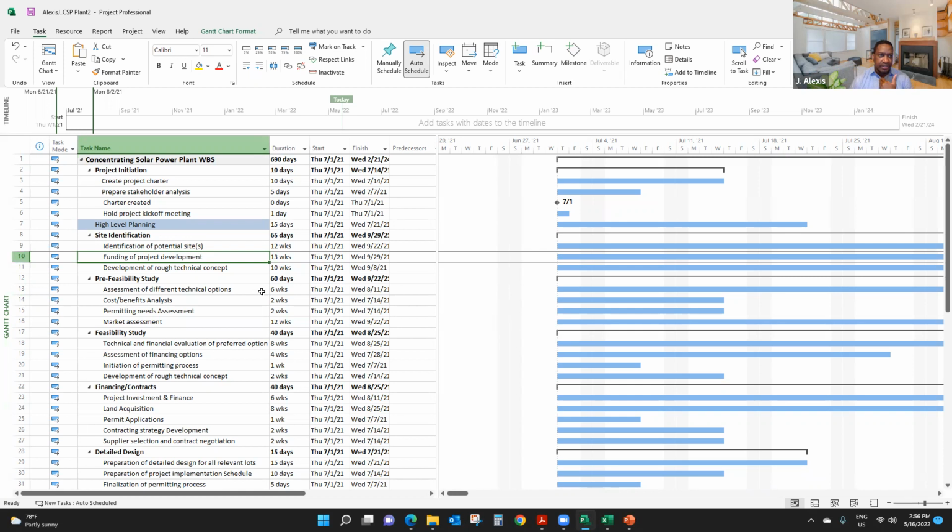And you can actually custom design the calendar for a project, if you're working on a project that has a different calendar than your organization's. For example, say that my project only works, people will only work 4 days a week. From Monday to Thursday, then you can create your calendar, say, well, the rest of the organization is going to work Monday to Friday, but on this project, we're going to work Monday to Thursday.